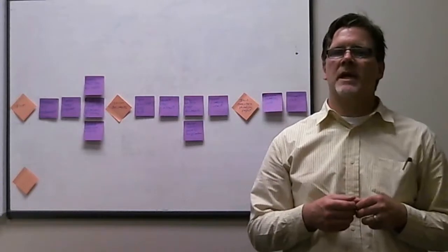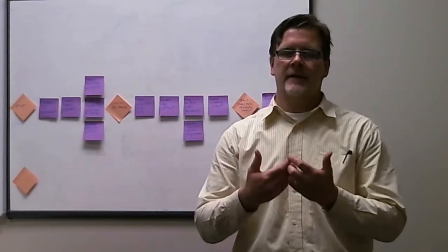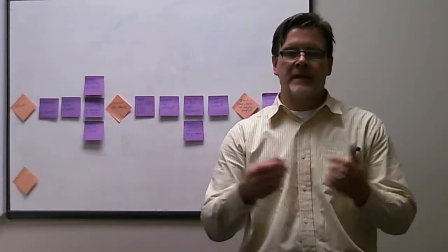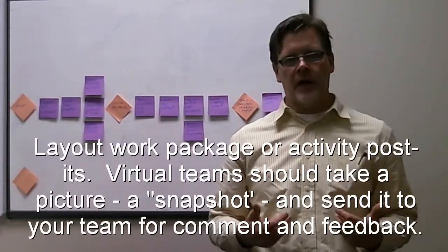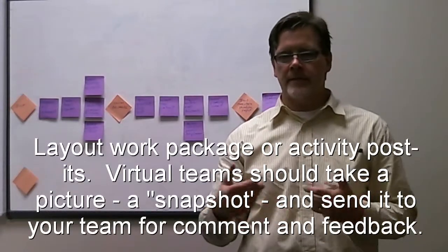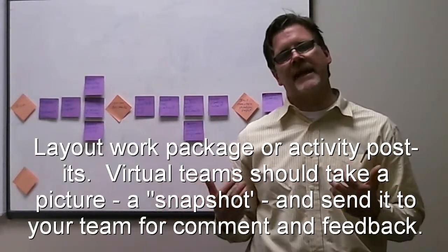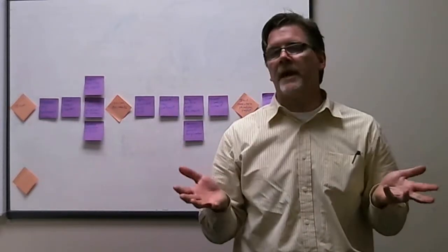So the first thing that we want to do is we want to take our activity list and have some fun with this. So in a couple of ways, what you can do, you can kind of see this behind me, is to take the list that you generated of the activities and write them on a post-it and lay those post-its out in front of you and just don't worry about networking other than just translate and take the activities and put those activities on post-its. But it's entirely up to you.